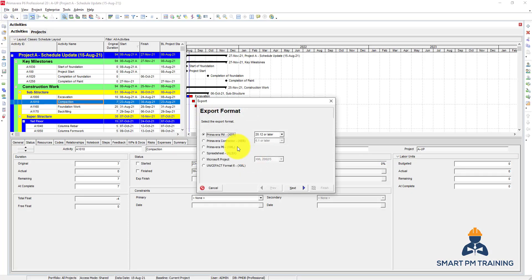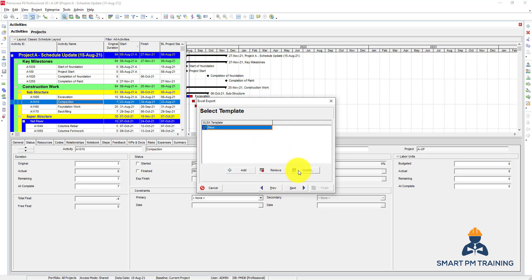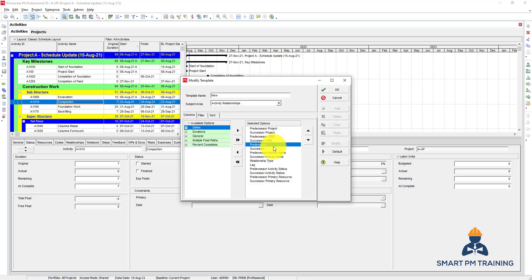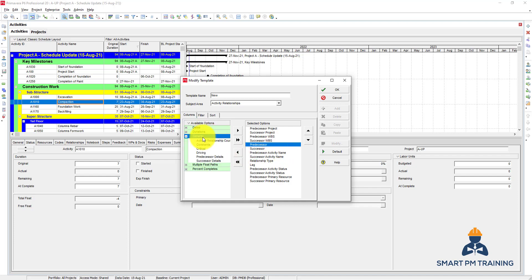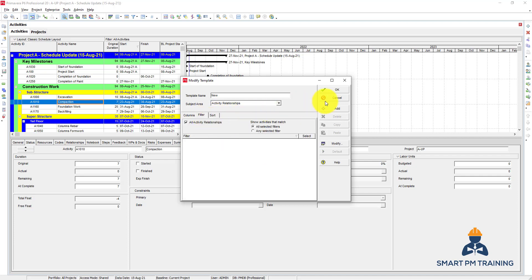You can also export Excel and choose Activity Relationships — in that case you will see a different template showing predecessor and successor information. The list of available columns is different from when you export Activities. Everything related to relationships is here, such as lag, predecessor, fluid multiple, and fluid path. You can also apply filter and sort.